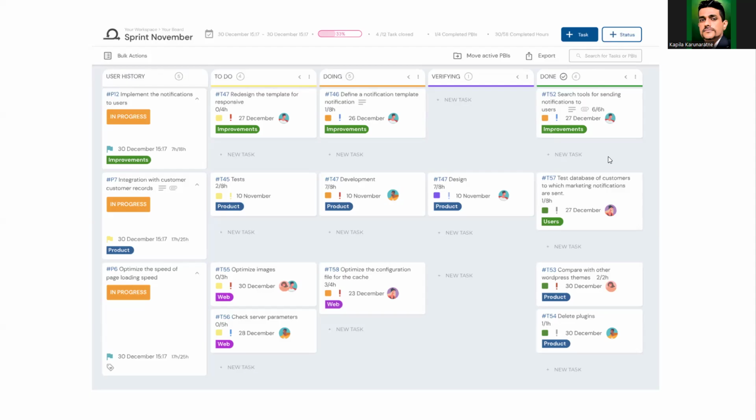So every morning when we are doing our status updates, we move these sticky notes from one column to another based on the completion state. At the end of the sprint, everything should be under done. At the start of the sprint, everything is in the to-do column.